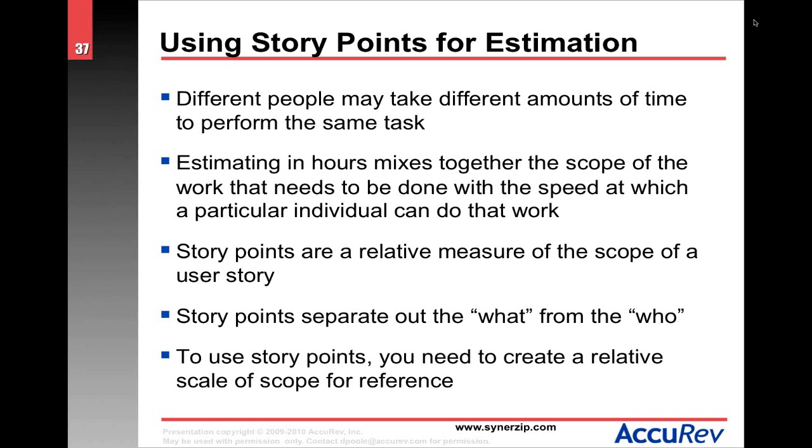The idea behind a story point is that different people may estimate differently. Story points is this basic idea. It doesn't matter what you call it. It happens to be called story points, where you separate your simplest task is going to be a 1 complexity on a relative scale. So it might take me 8 hours, and it might take you 2 hours. But the thing that needed to be done is the same.